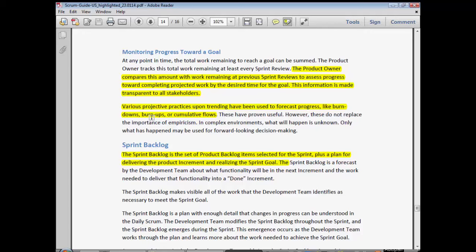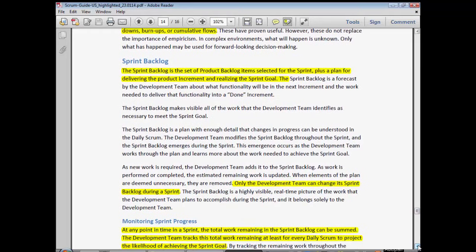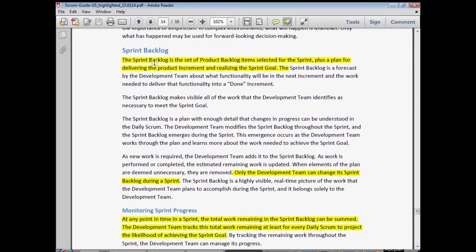Sprint backlog. The definition of sprint backlog is the set of product backlog items selected for the sprint plus a plan for delivering the product increment and realizing the sprint goal. The sprint backlog is the set of all items or features or stories plus the tasks. The tasks are an example of a plan for delivering the product increment — the team breaks stories into tasks, and the tasks and items together form the plan.